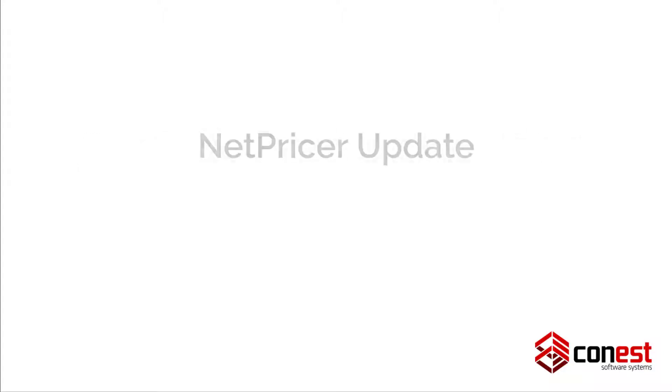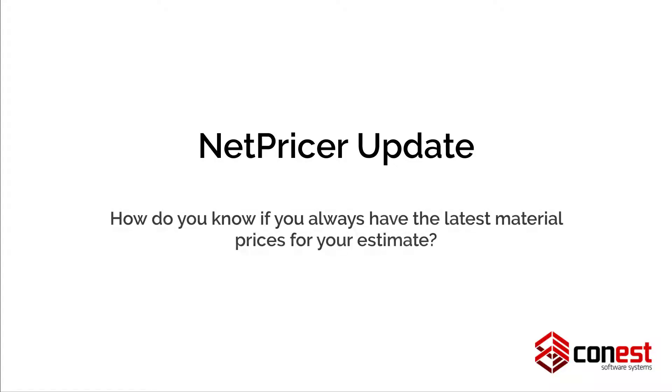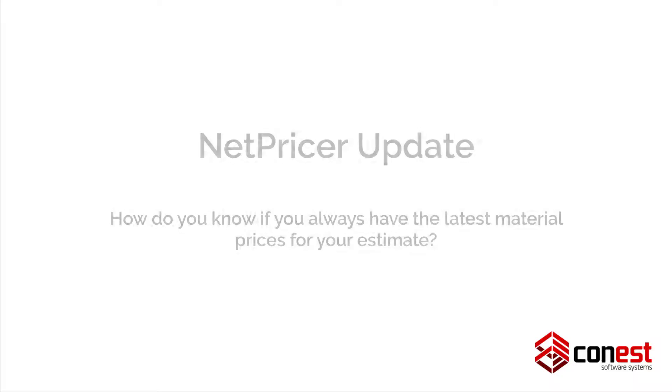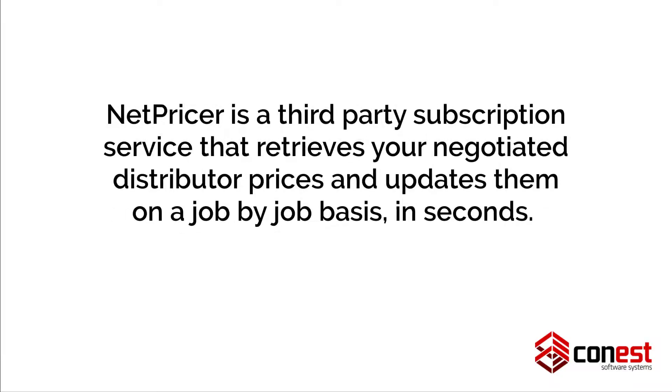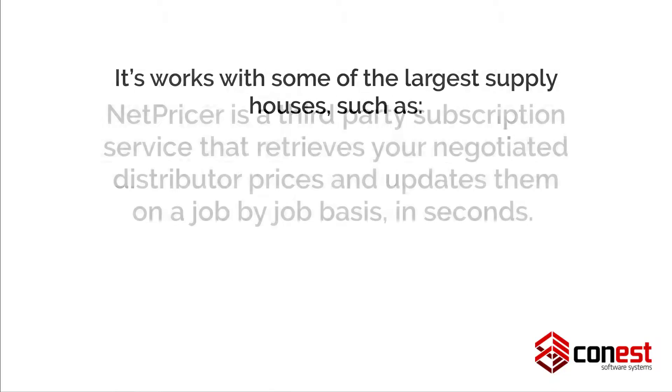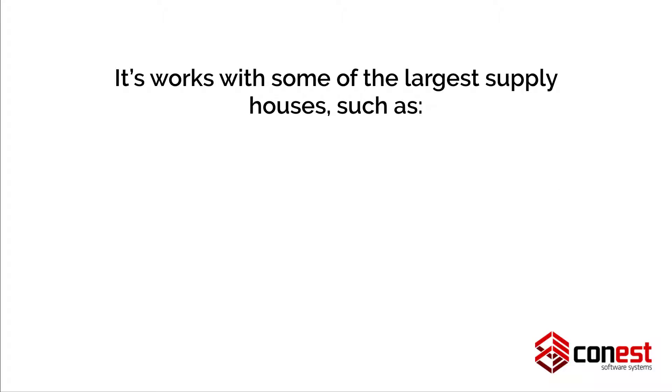Feature number four, IntelliBid's NetPricer update. How do you know if you always have the latest material prices for your estimate? NetPricer is a third-party subscription service that retrieves your negotiated distributor prices and updates them on a job-by-job basis in seconds. It works with some of the largest supply houses, such as Rexel,